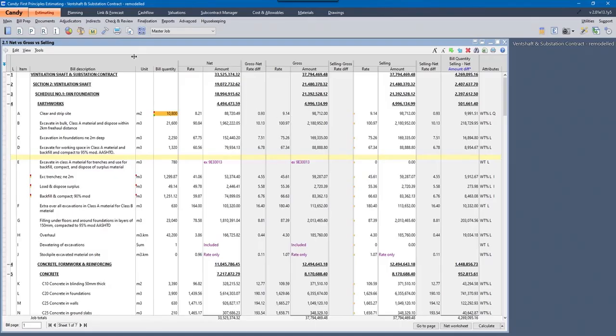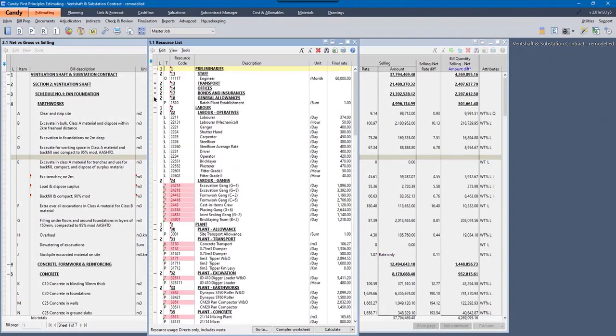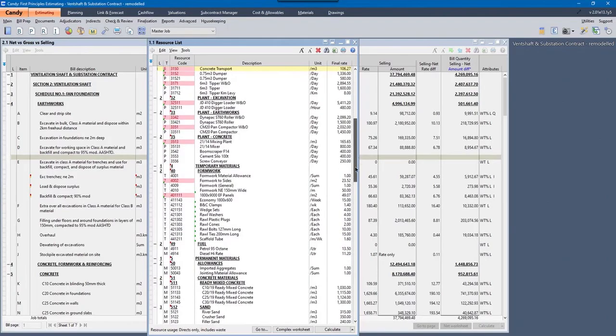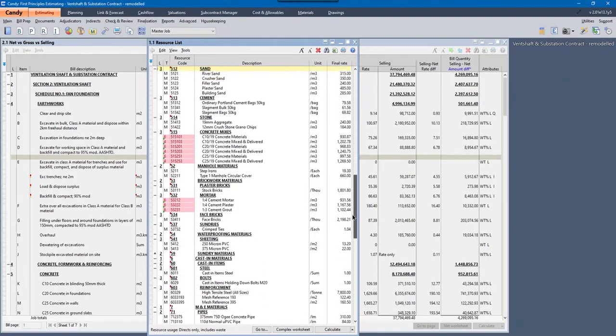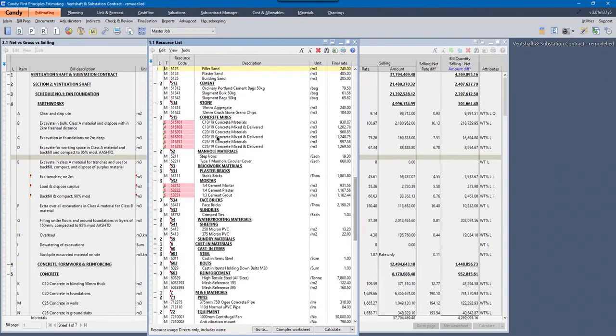So taking into account my resource betterment, I'd like to renegotiate a better rate for my cement. So going to my resource list, and you'll see the cement there. There's my rate of $79.58 per bag. So let me change that rate. I get a better resource rate in place, and I've renegotiated. Let's just say it's 77 per bag now.